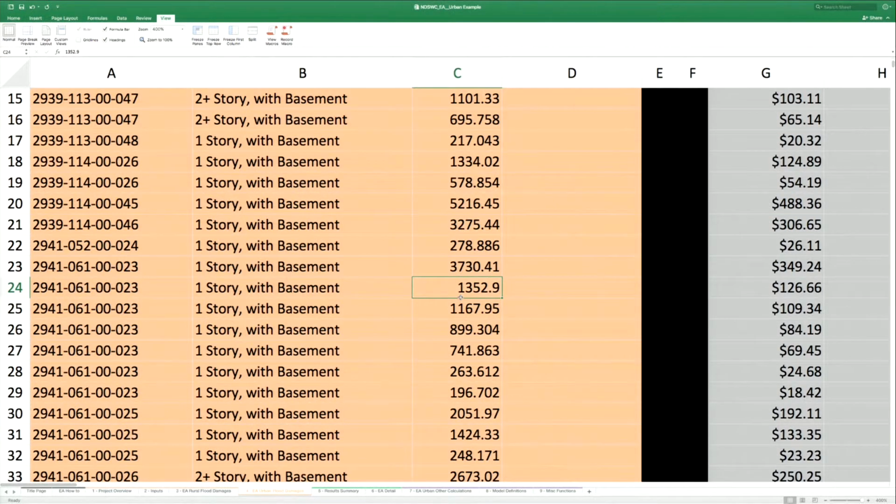If it's commercial, industrial, or public, you'll need to provide a value, and usually an assessor's database is a good estimate of those values. For example, if you have a commercial property, you can go out and look at the assessed value for a commercial development and have the value of the building that you can use in the analysis. Pat? And just without the header in there, the model does know that those are in thousands.